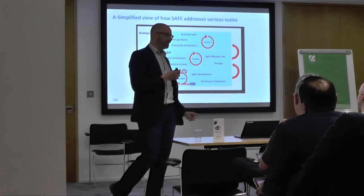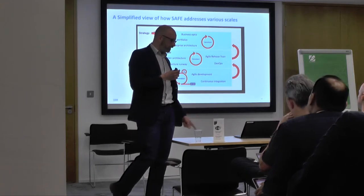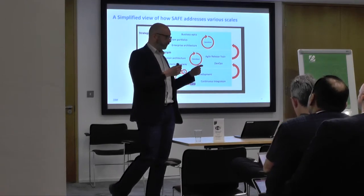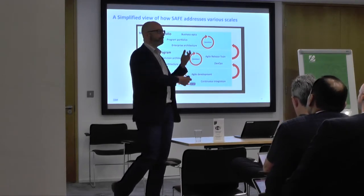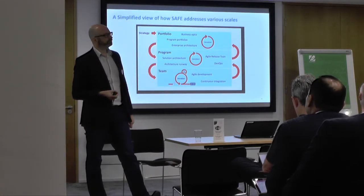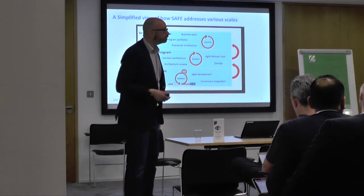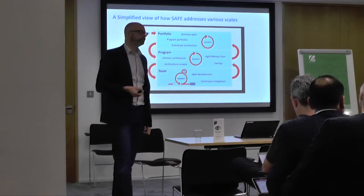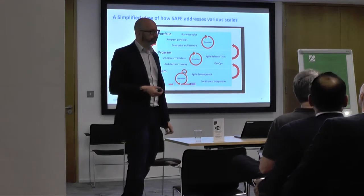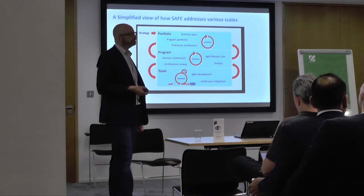There's a need to think about how you make sure the stuff relevant beyond the features of the product owner — some of the interoperability type requirements — actually gets addressed. If you just focus on features and never really deliver a technical sprint, you never deal with the technical debt. So rather than always dealing with features, you've got to talk about how you prioritise the technical requirements too.